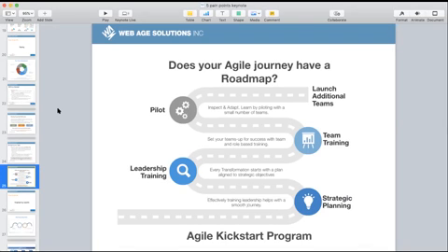And then I like to always do a pilot program with an organization with a small team so that they can build the skills and we can tweak it on one team before we move on to others. And almost always I discover then that those other teams around them start to see things happening differently and they want to get involved. So basic training of the leaders and the team and then always running a pilot is a great way to learn